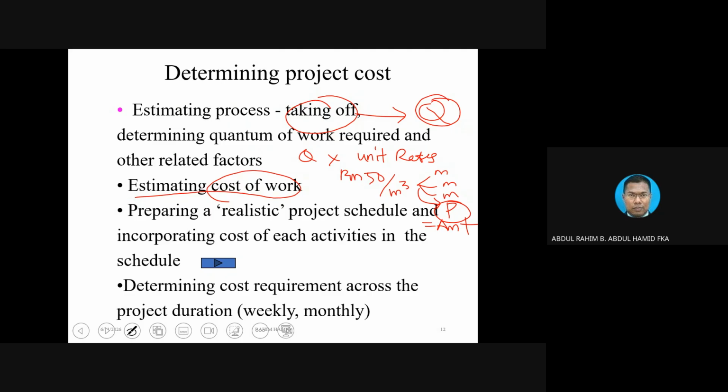But overall, when you add up, you are going to have one amount for easy discussion. Okay, that is the total profit, like 20%, for instance. Then this project cost will be put into what we call activities or tasks, and then again distributed accordingly.